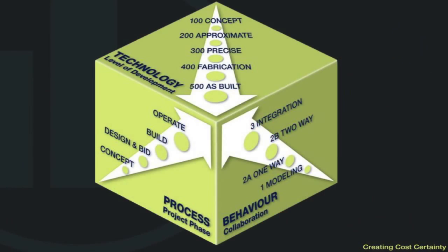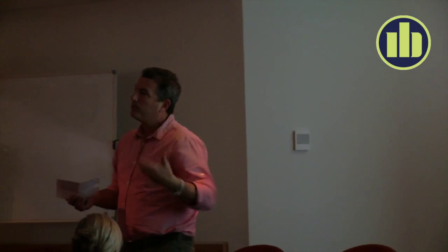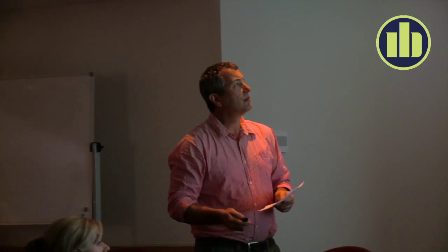In terms of our biggest thing that we do, it's this one, work the concept. So if we can drive the functional efficiency of a project, you will make the biggest effect on that project that you could do. The idea here is to make big decisions at the beginning, get those changes working down a funnel. As we know more information, these decisions at the other end are fine-tuning. In the old world, we would usually go out to tender, find out we've got a problem, and then start deleting carpet and landscaping and so on. Getting that job back on track is really, really difficult to do.